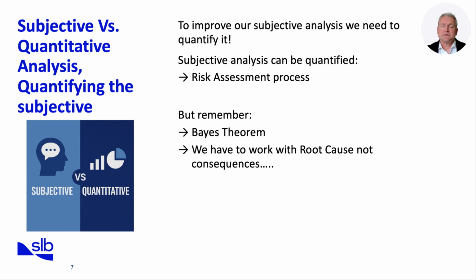In plain terms, Bayes helps us update our understanding of probability as new information becomes available. For example, if we initially estimate the likelihood of stuck pipe as low, but later receive offset data showing multiple recent events, Bayes allows us to revise that probability upward in a logical way.